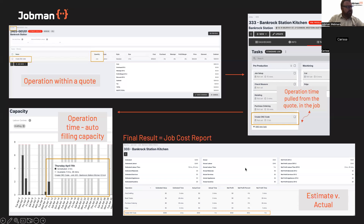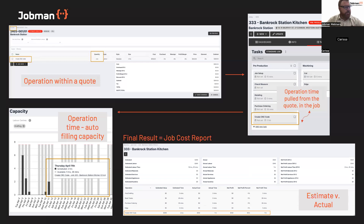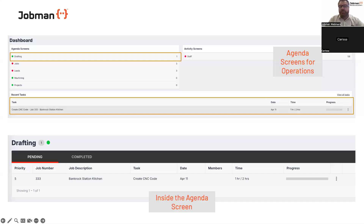The final result of this breakdown is: because we have time in our quote, we have an estimate — that time is pulled into our operations inside our job management flow, which is then tested versus our capacity. We can then have the team measure their time. In this instance, we estimated it would take two hours of CNC code production, and we managed to get the task done in an hour. So technically we're 50% more productive on this job, which of course impacts at a foundational level your profit.